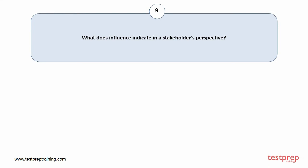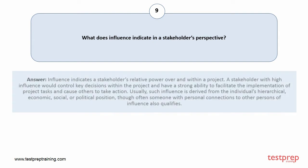Question number 9: What does influence indicate in a stakeholder's perspective? Your answer is: Influence indicates a stakeholder's relative power over and within a project. A stakeholder with high influence would control key decisions within the project and have a strong ability to facilitate the implementation of project tasks and cause others to take action. Usually, such influence is derived from the individual's hierarchical, economic, social, or political position, though often someone with personal connections to other persons of influence also qualifies.